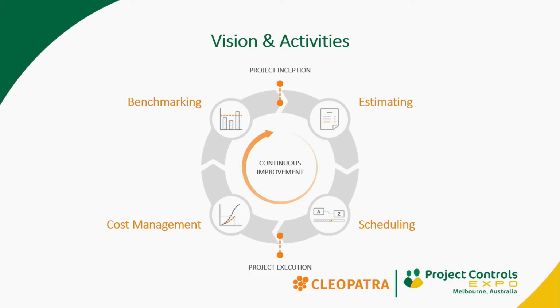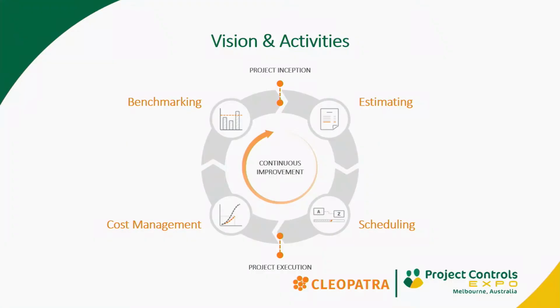So within Cleopatra, you actually have the possibility to recast an estimate towards a budget in one of the different structures, the reporting structures that you'd have in there, such as a WBS, for instance, and then work our way into the execution to manage the project on, obviously, your costs, so commitments, actuals, as well as your progress, as well as your variations of changes, and use that information to report, forecast, and eventually use that information to steer the project into the right direction.